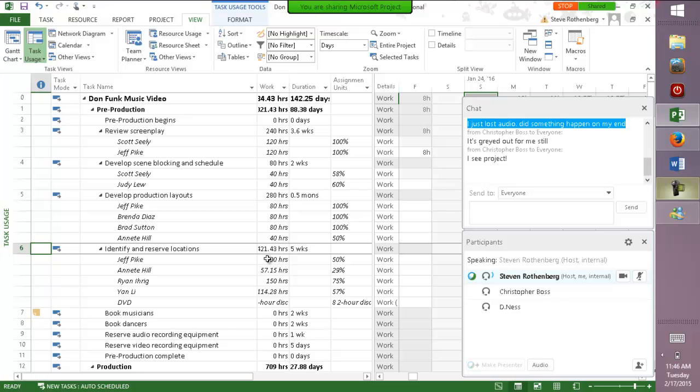We lowered one guy from 57 to 50% units, but then we increased the other one from 57 to 75%. So essentially we put more manpower on this task, and therefore, because the duration has been kept constant, the work has gone up. So that is an explanation for changing the task type. And again, almost beating a dead horse, but you can decide that you're going to keep any one of these parameters fixed: work, duration, or units, and the other two have to change.